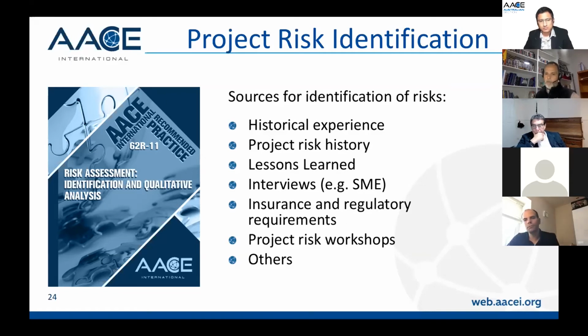Lessons learned, and obviously interviews. In this case for this project, we had to engage with some of the experts in the company, some SMEs for the retractable roof for the stadium, as we didn't have all the experience with this sort of roof. Insurance and regulatory requirements: again, as I mentioned before, you may have some risk that you are not allowed to insure, so you need to be sure you put some allowance in, whether in the schedule or in the budget.